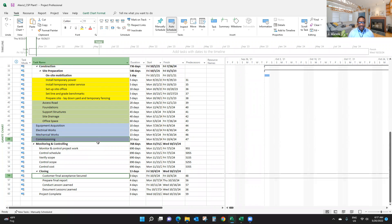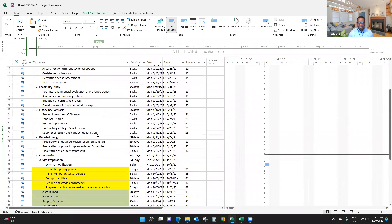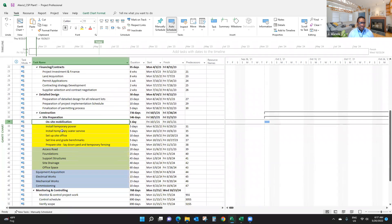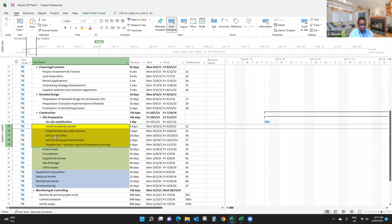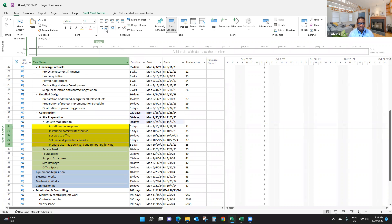That's how you link activities in Project. Now, if you take a look at your software and see there is something that is not linked, you have to make sure it is. The problem is you can't have activities all at the same level. These activities usually start with a verb. What I'm going to do is link those activities. I'm going to indent these activities under site mobilization. Using this, you see here now everything is part of the network.